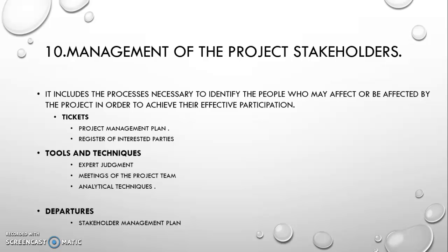And analytic techniques. The level of commitment of all stakeholders should be compared with the anticipated level of participation necessary for the successful execution of the project. The levels of commitment of the stakeholders can be classified as unaware, resistant, neutral, supportive, and leading.